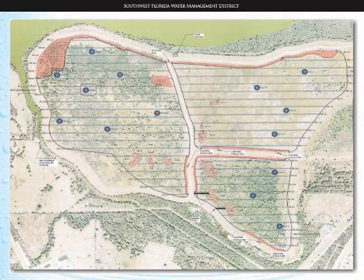This is a planting scheme for the project. The horizontal lines running across the cells, those are the planting strips. With 1,000 acres, we couldn't plant all 1,000 acres, so we made some pilot studies. The cost-effective approach was to plant these 35-foot wide strips separated by about 200 feet across the wetland area. And those would infill over time, and that was the cost-effective approach.